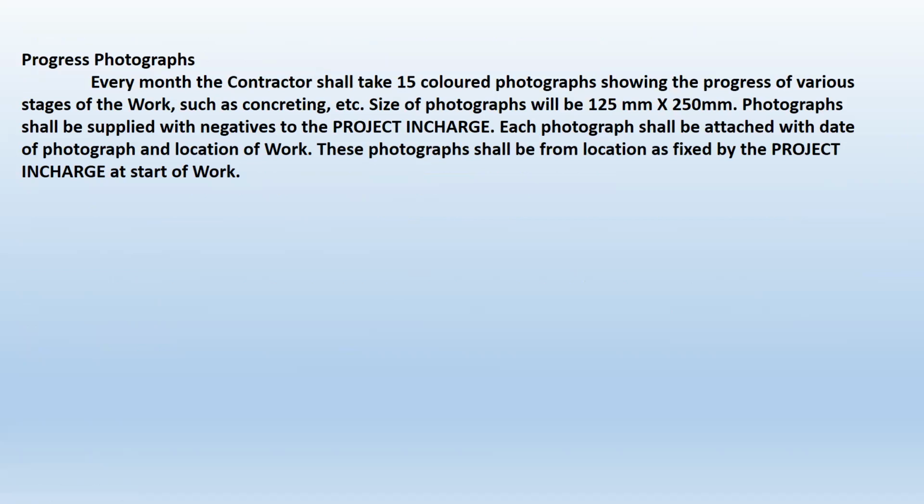Next comes the progress photographs. For monitoring your progress, the contractor has to submit photographs every fortnight showing what work has been completed.